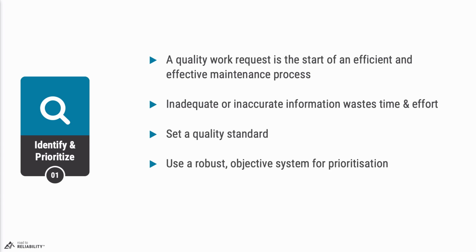Now, the area where many organizations go wrong is in the prioritization of new work. You must make sure that you adopt a robust and objective system for prioritization of new maintenance work requests. If you, like many organizations who start out with planning and scheduling, are in a reactive maintenance environment, you will be getting a whole heap of work requests come through each and every day. And unless you prioritize these work requests properly, you will never break through that reactive maintenance cycle. Prioritization is truly a critical step, and you really need to get it right. In Module 3 of this course, I'm going to provide you with 2 different prioritization approaches that are both robust and objective.